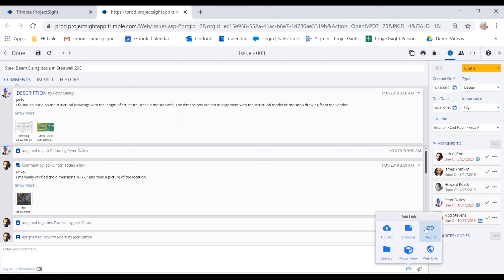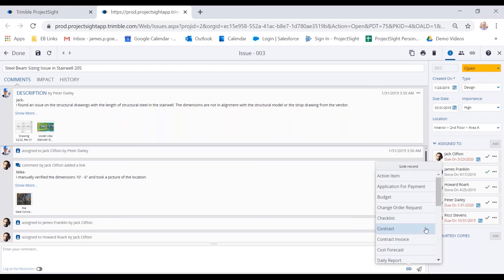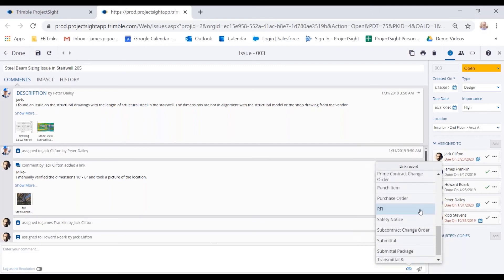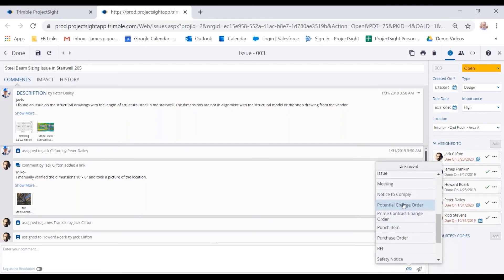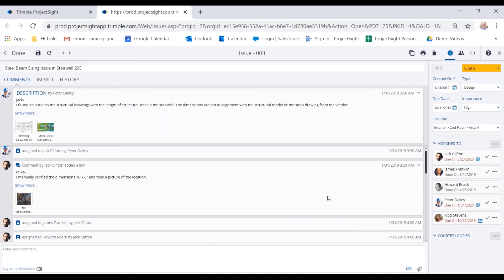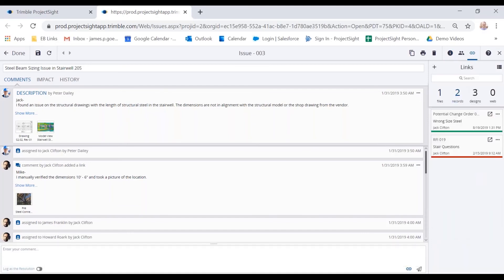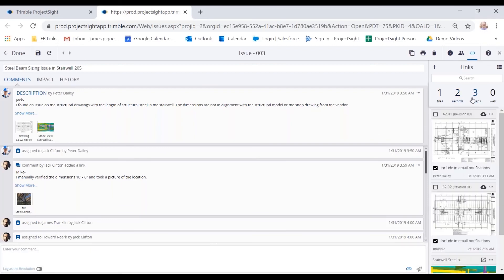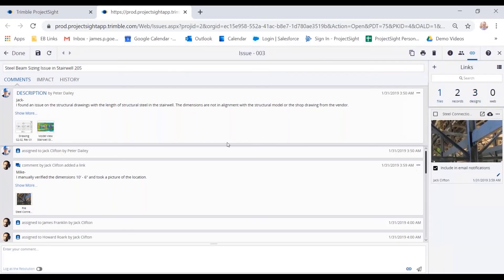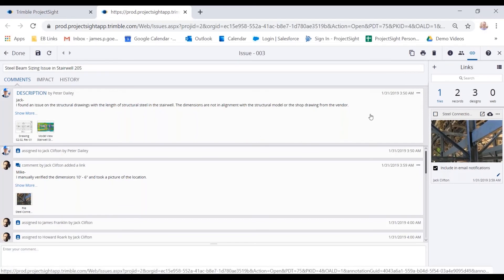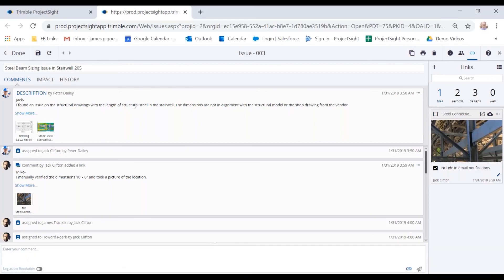So Project Site is very good about linking records together. So if this issue had a cost impact, and I need to create a potential change order from this, or notices to comply if it's a safety issue, I can do that. So I can quickly click on this potential change order, create new. And that way, when I'm looking at the change order throughout that process, I can always see that it was referenced here. In my link icon, I can see the various records that were linked to this specific issue. So there's a change order here, there's an RFI as well. There are three design files, and there's one uploaded image. So a very consistent trail of information within Project Site can be built, and just allows you to see that full issue and the history of that issue through the process.